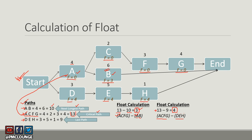To summarize: Step one — calculate the critical path. Step two — subtract the critical path value from the next longest path value to get the float for those activities; note that critical path activities retain float of zero, which is why we didn't change the value of A. Step three — repeat for remaining paths, which is how we calculated the float for activities D, E, and H.